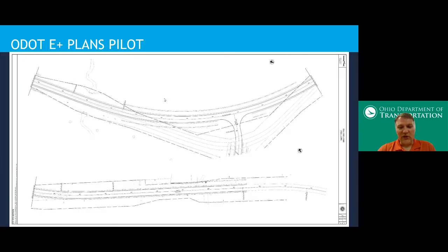Same thing with the plan type view, and really some of the feedback we heard right away is this is the view that most people are wanting, especially for maintenance of traffic control type plans where we can see almost an entire phase on one sheet. So the contractors are really liking this. The other DOTs that have done something similar, they're saying the contractors like this. It's easier to hang up in the trailers and take out into the field, see the whole MOT phase at once.